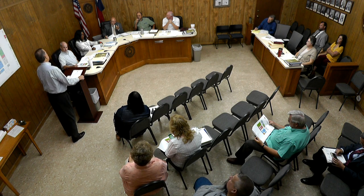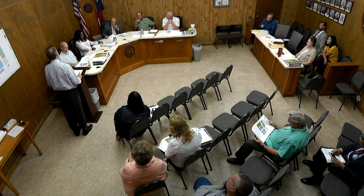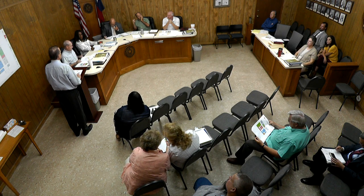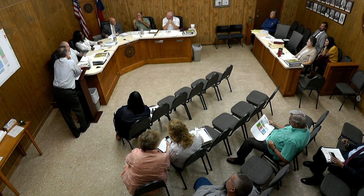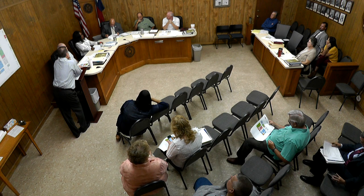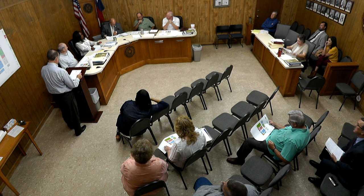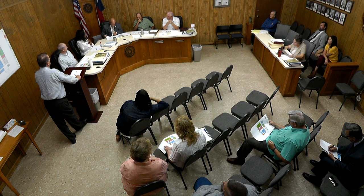So if you did 8.7 and you did another 5, you're looking at 13 and a half, less than 14 million, no more than 14. And those are kind of some of the numbers we were looking at before in May. We were in that 12 million. Well, the contract that Judge Lamond signed, the original scope was a one-story 35,000 GSF building, and the estimated construction cost of the project was $7.5 million. And now we're coming in at 21,746 and about 8.7, and then to do the other, I mean,